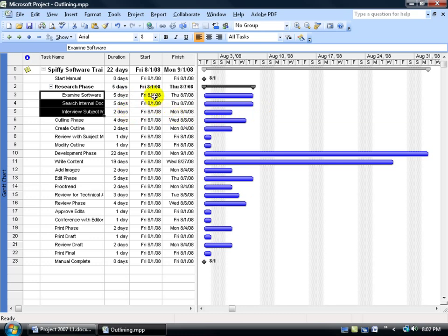Now, I know your tasks are not all going to start at the same time, and we'll cover this in a later training video on creating links or linking up our task and creating relationships. In other words, when this task completes, 5 days, then start the next one. So that's an additional 5 days, you've got 10. And then when that one completes, do the next one, so you're 2 days further out. So when all is said and done, you've got a total of 5 days, then start the next one 5 days, then start the next one 2 days, and you've got 12 days. It'll summarize that and give you 12 days. You should also know that it also summarizes the cost.